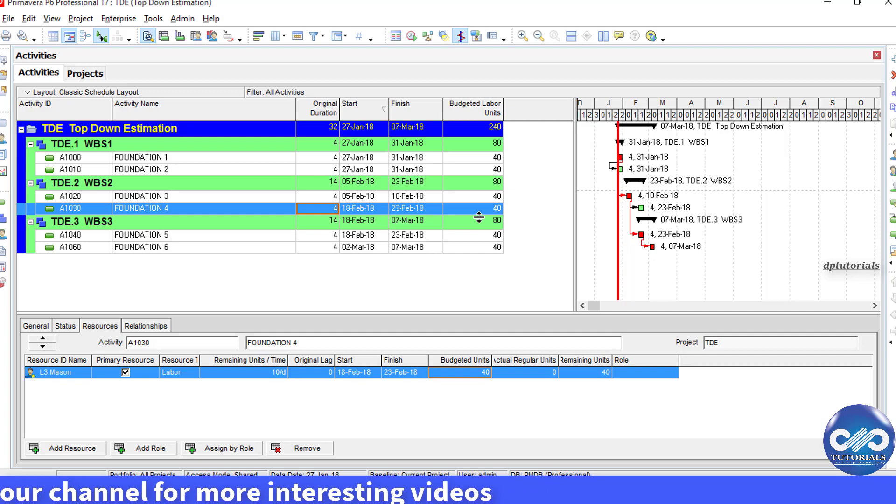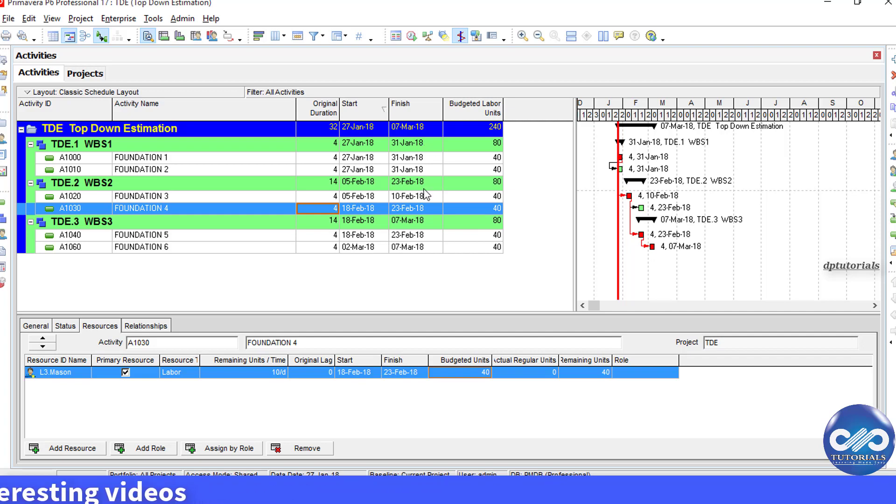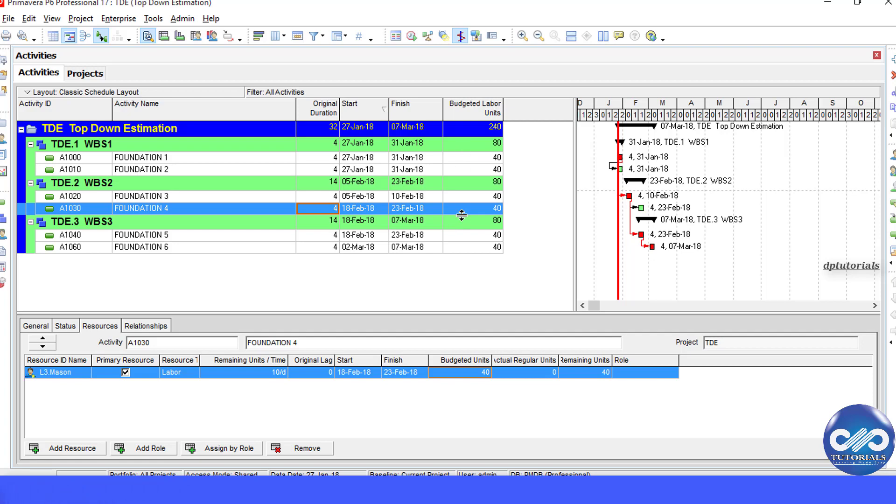Now, we will use the TopDown Estimation to redistribute the units to make it more realistic. To perform TopDown Estimation, you must first assign estimation weights to WPS and activities as well.